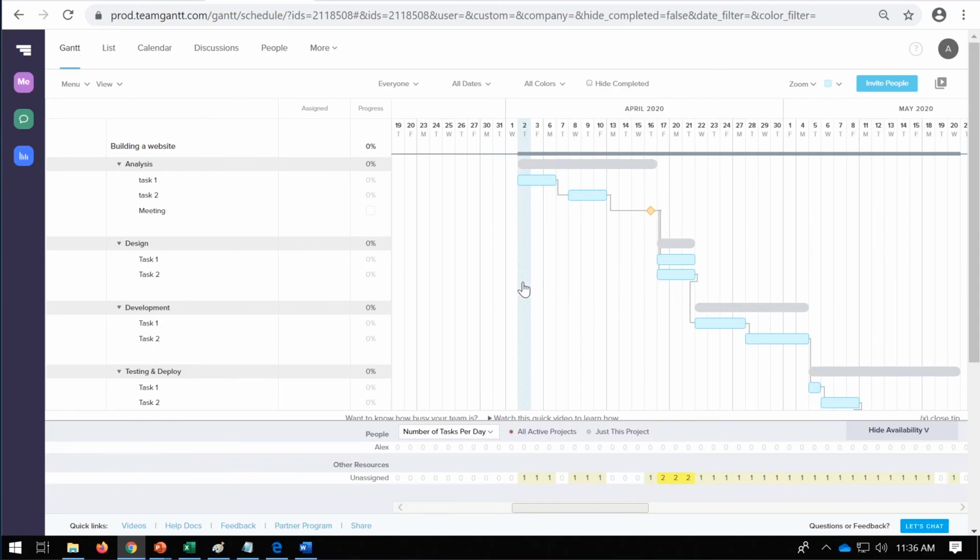Here is a final view of what this project plan might look like. We've got 4 clear sections of work that need to be completed. At the end of each section, I might include a milestone meeting. That meeting will just confirm that everything's been done in that task, or sign off that work, so that we can move on to the next phase. We can see this timeline of events utilizing these dependency lines, so we can clearly see when something starts and where something ends, and the fact that these are dependent on each other.